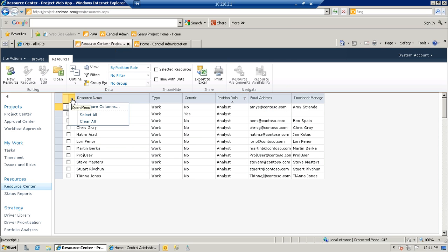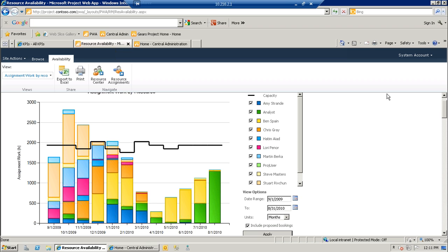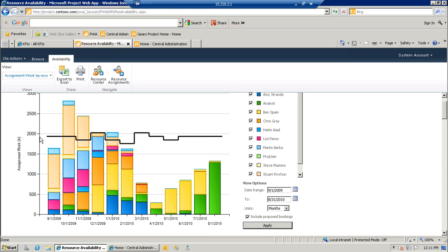This shows me all the analysts that are in the organization. And then I can look at resource availability across that analyst role. So this is a nice graphic. It's called assignment work by resource. But you can see this black line indicates the total capacity for all the resources in that role. And the bars are the individual allocations of each individual.